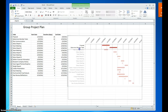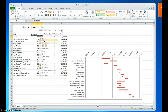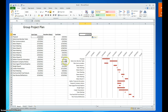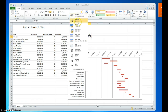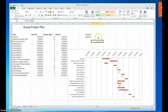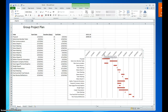To figure out the numeric values for the beginning and ending dates, I'm going to copy the start date and the ending date into a couple of cells. Right now they display as dates, so in order to get the numeric value we're going to change the format from date to number format. Now we have the numbers that we're going to place into our x-axis min and max fields.